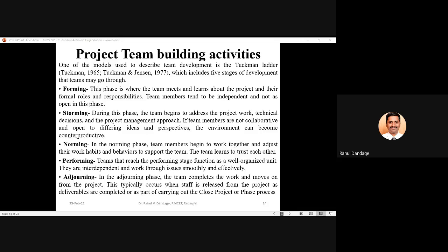So this particular activity is called the storming activity. We also talk about brainstorming. When we say brainstorming, we just go on putting ideas, whether they are relevant or irrelevant, appropriate or inappropriate, feasible or not feasible. We are not thinking anything. We simply go on putting the ideas one by one, listing them, and once they have been listed, the second part will be thinking about which is good, which is bad, which is appropriate, which is not appropriate, etc. But whenever brainstorming is going on, nobody is preventing or stopping others from putting their viewpoints.